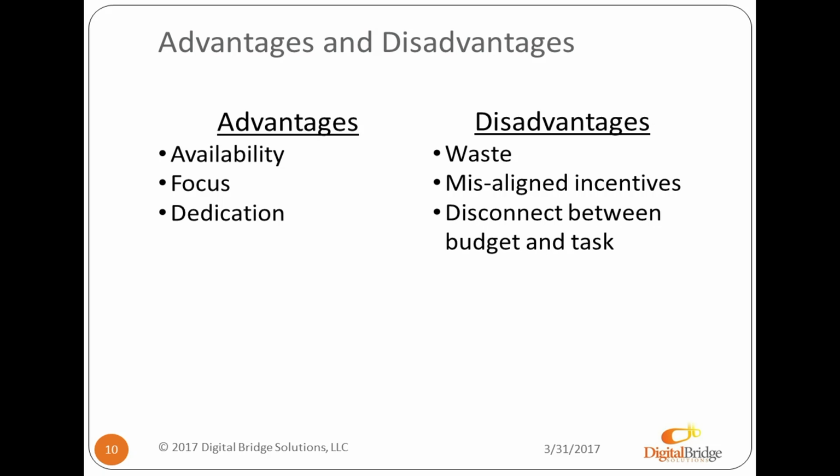Parkinson's law states that any task will fill up the amount of time given to that task. So given a 40-hour week, there's a tendency to fill up that amount of time, whether that's needed or not. And that can account for some of the waste. Depending on the client's size, maybe that's a huge deal, right? For some of the clients, a 40-hour work week for one person could push them out of the range of their budget.